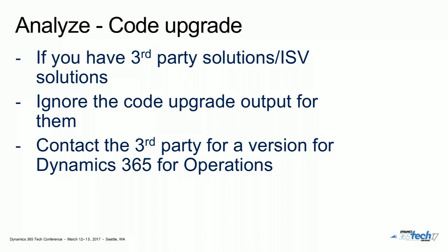The question was, can you decide to leave the third party behind? Yes. I tried that too. Effectively creating an AX 2012 model store without that solution in, and then running that through the code upgrade tool. That works. The challenge is when you want to bring it back in again. You're kind of postponing the problem, and any of your code that touched it is broken. Effectively, that 2012 model store, once you take that solution out, doesn't compile either. It already doesn't compile before you've even upgraded it.